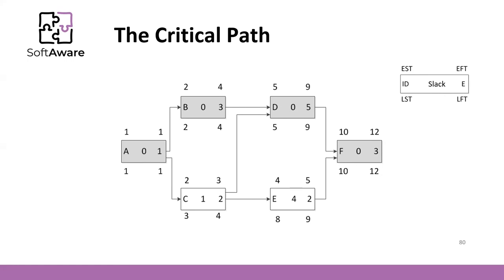What is the duration of the critical path of this project? We can sum the durations of A, B, D, and F: 1, plus 3, plus... giving a total of 12 units of time. So the critical path is 12 units of time. Any delay in this sequence of tasks delays the project.